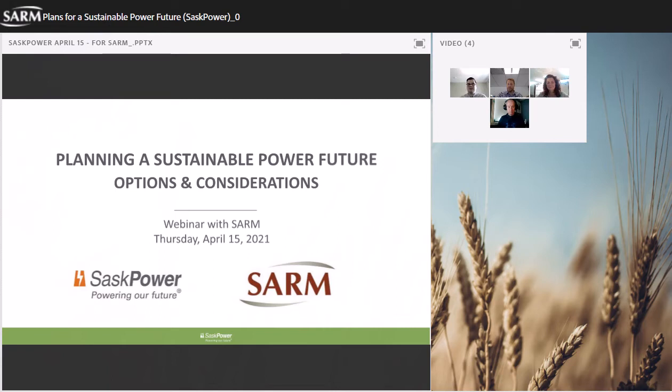This is probably the earliest we could have this type of facility operating, given where we're at today. There might be some opportunity to advance that a little bit, depending on how things go. There's also a lot of risk. These regulatory processes are quite intense, and they're not exactly straightforward when it comes to scheduling. So these could get bumped out, and some of these dates could get moved back 1 to 2 years quite easily as we progress through.